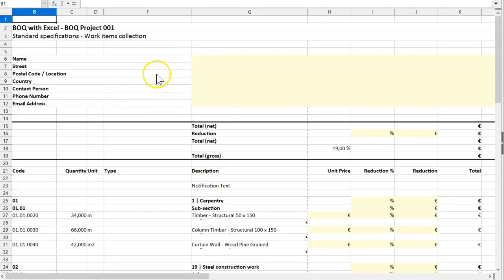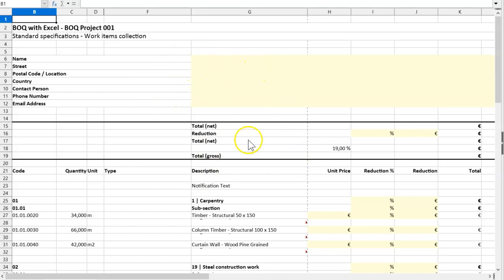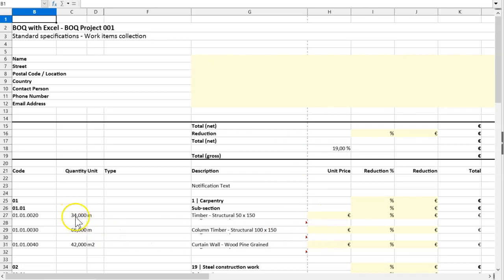This Excel file you can send to your constructors and they can fill out the yellow fields here with some general information and the unit prices. As you can see they are not able to change quantities or your text.